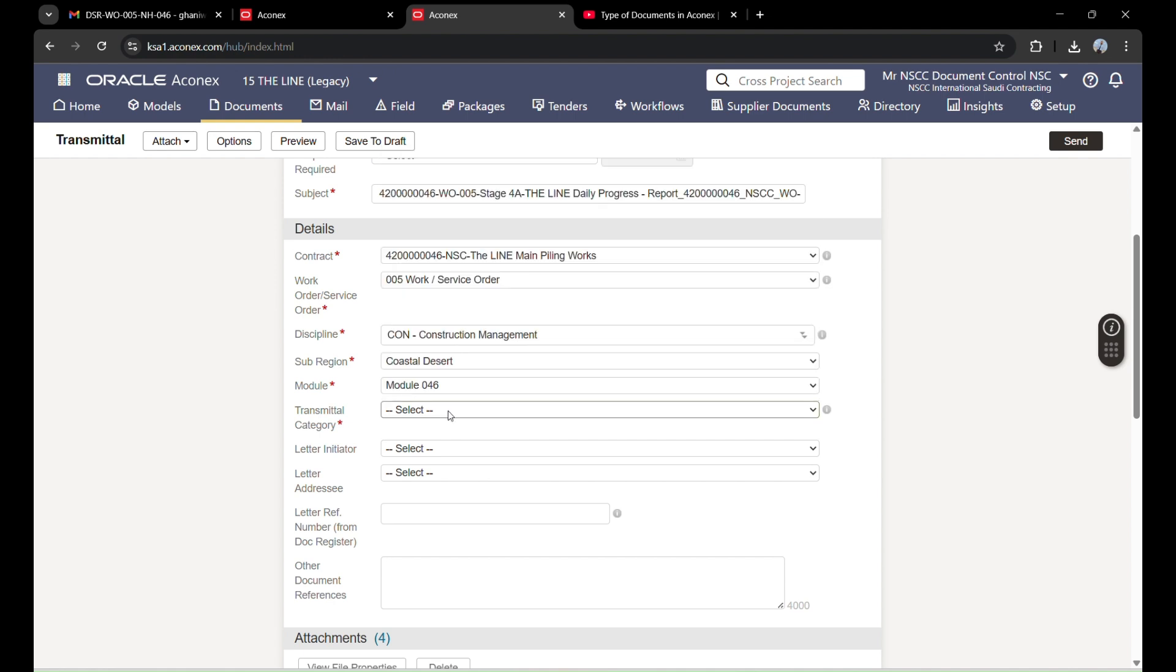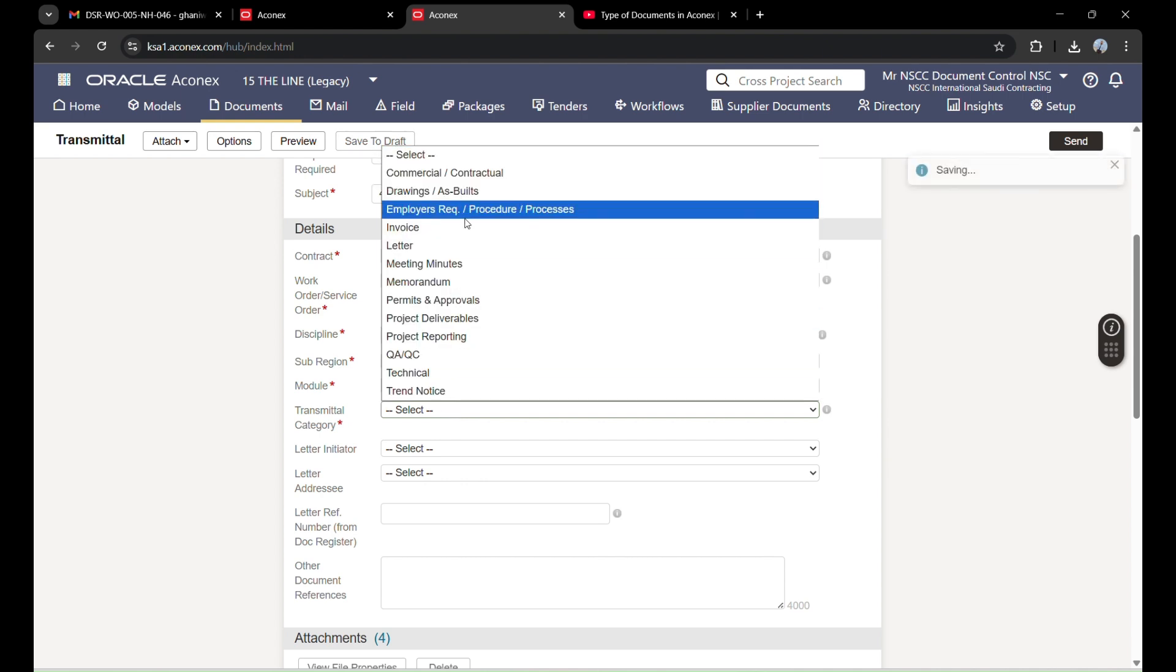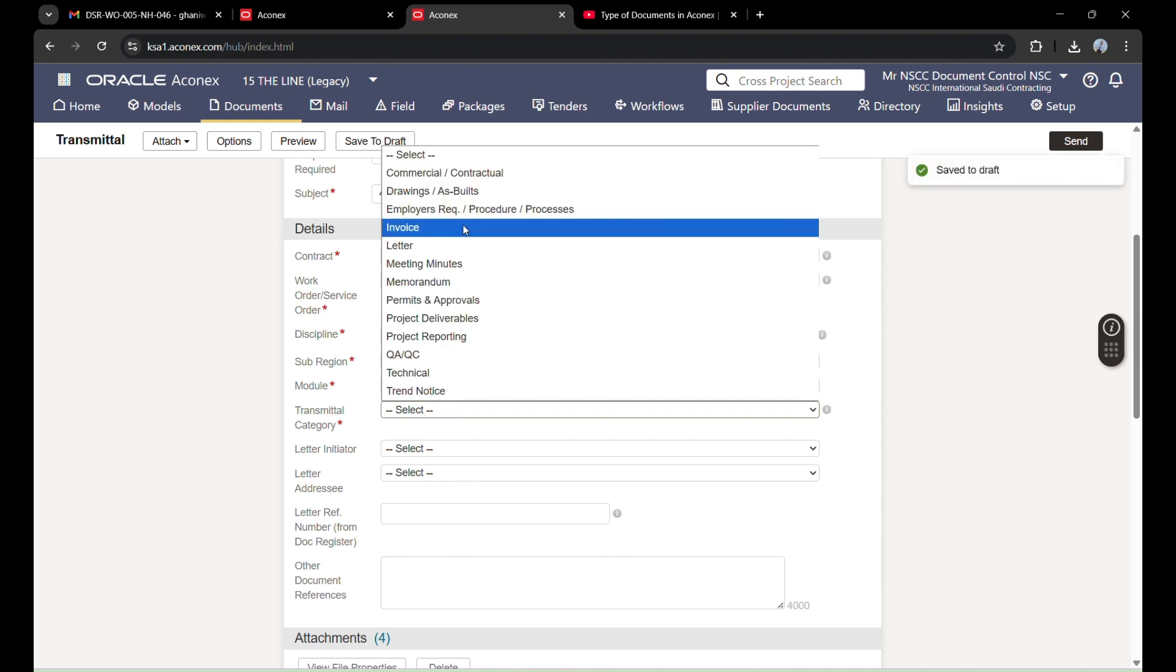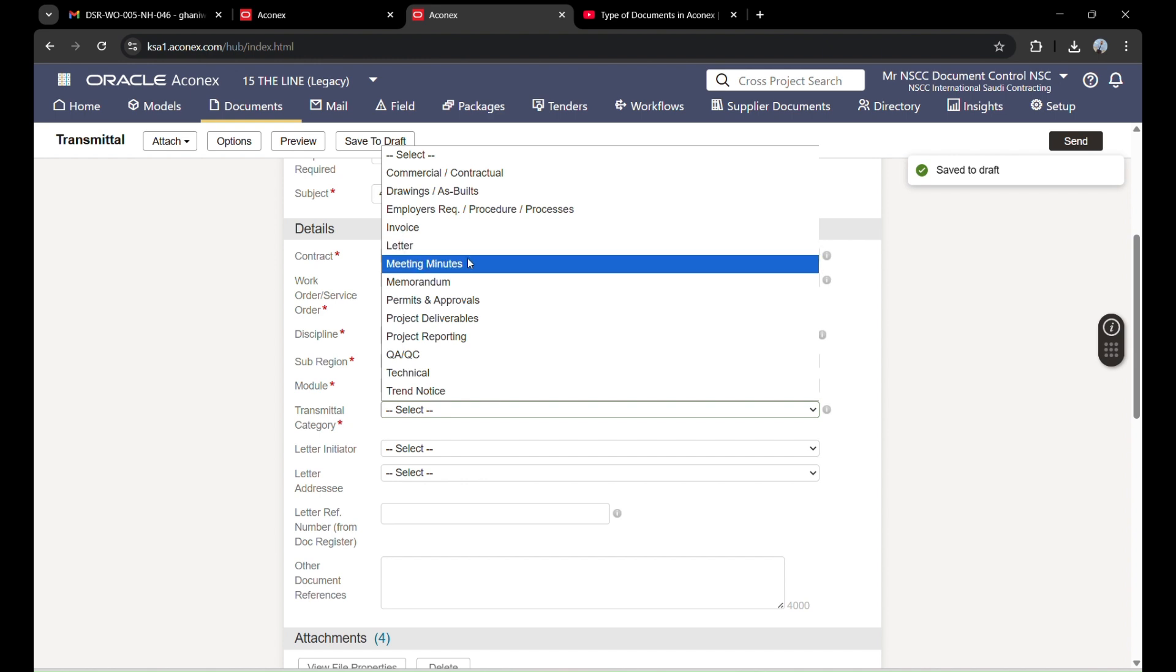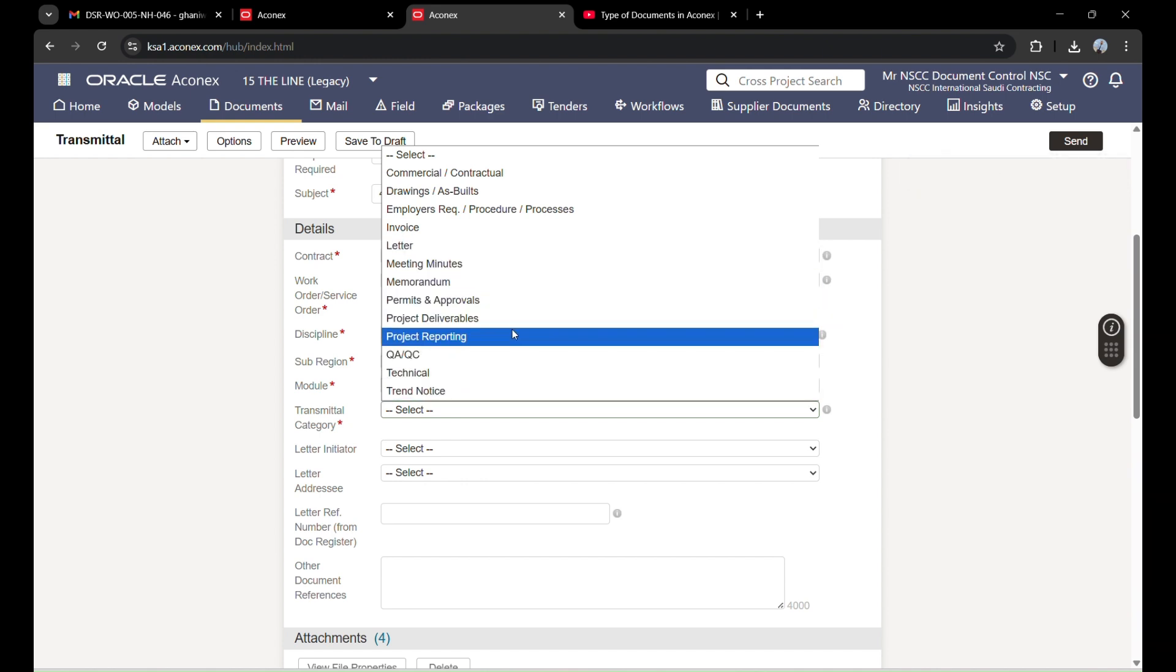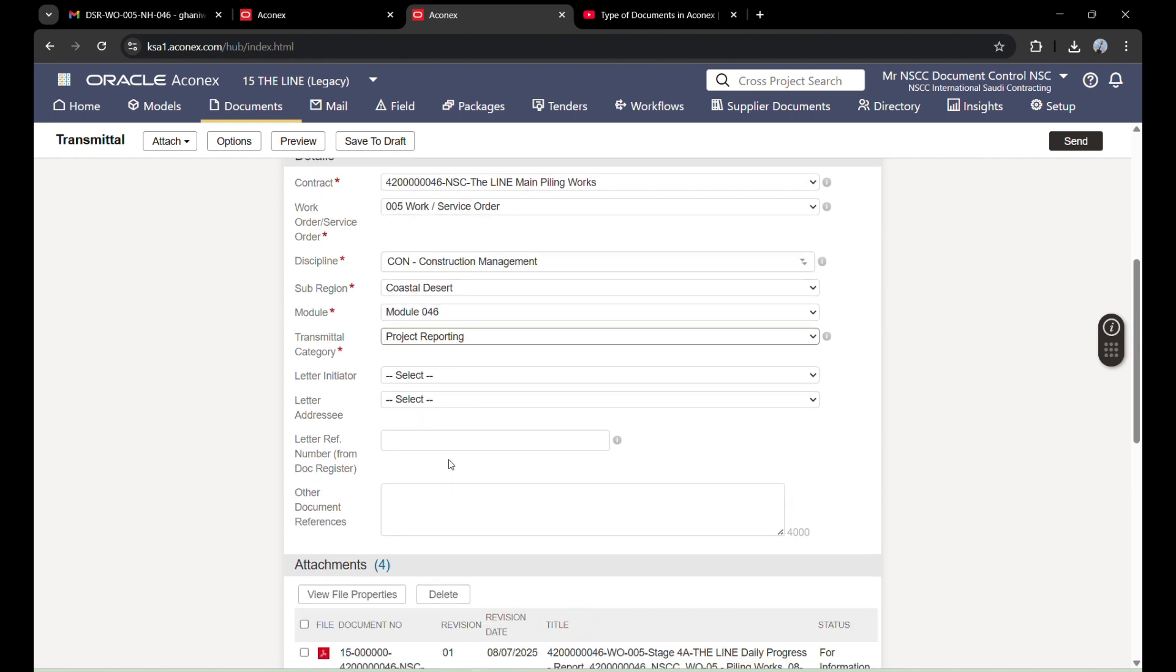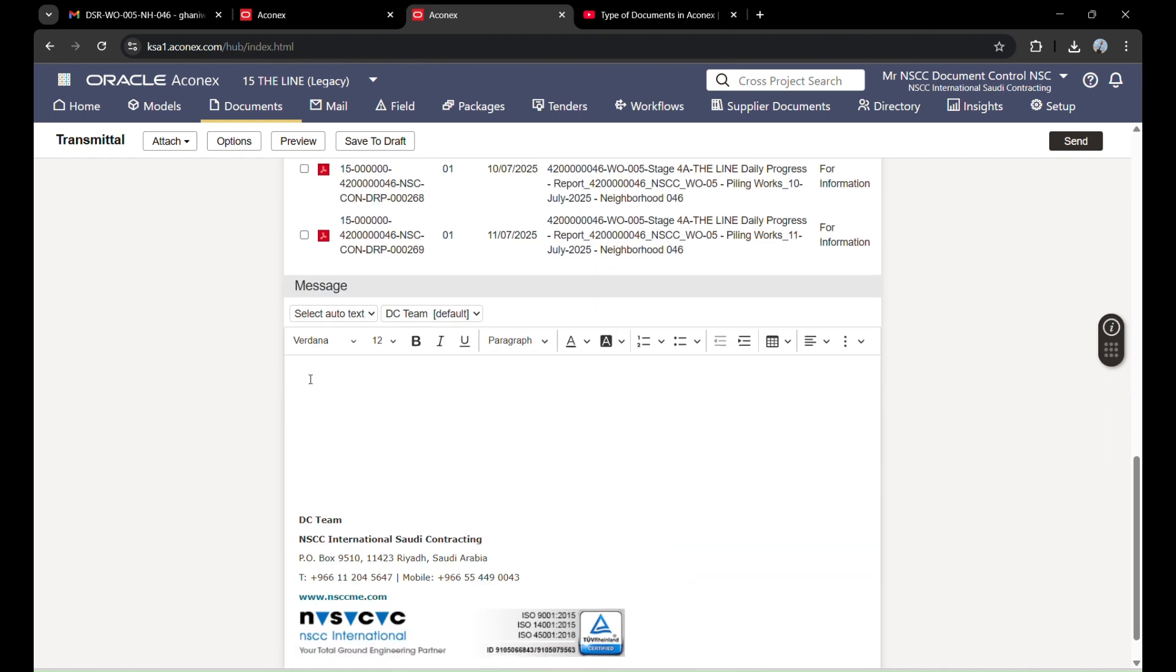Now transmittal category: as I am transmitting these documents, what is the category? Commercial, drawings, employer's request, invoice, letter of meeting, winners, random - you can select from here. But for our project, these documents are project reporting because this is a daily report, so I will select this option. Now all the options having a star are filled.